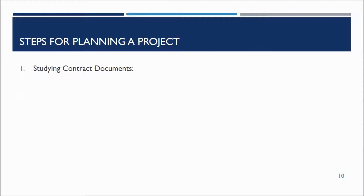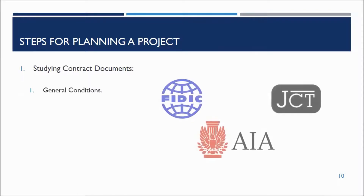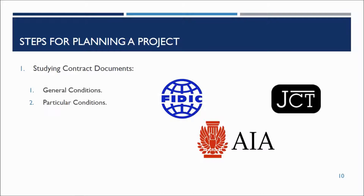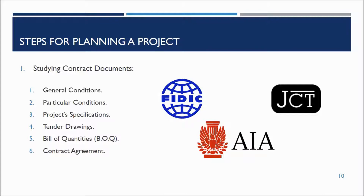In order to start planning a project, there are some steps to follow. First, study contract documents that consist of general conditions. There are many standard forms of contracts such as FIDIC, JCT, or AIA. These documents also include particular conditions, project specifications, tender drawings, bill of quantities, contract agreement, and addendums and amendments — all of which are contract documents.